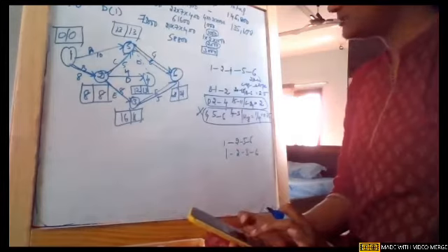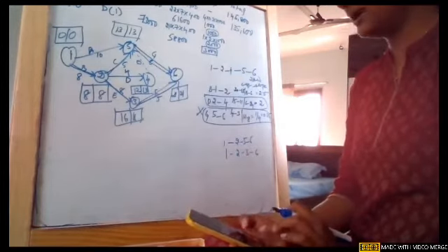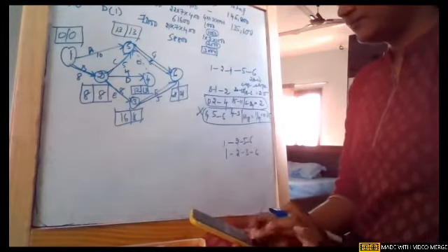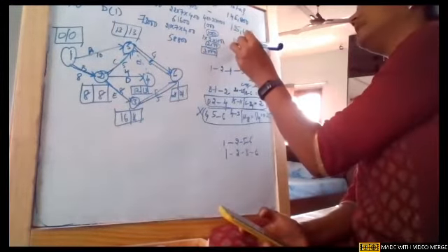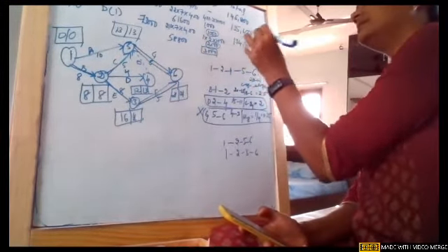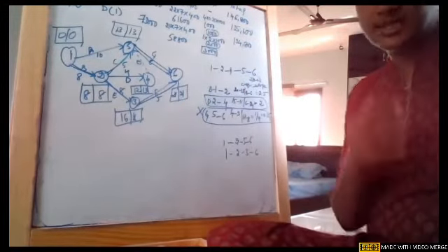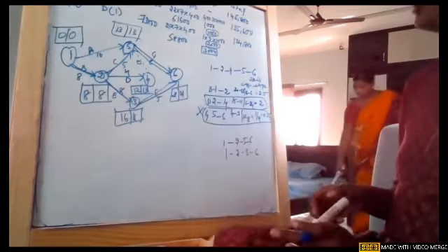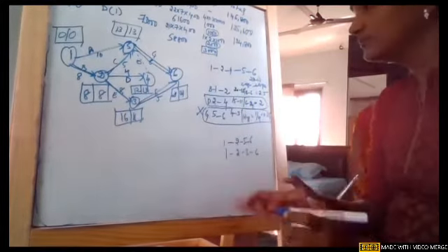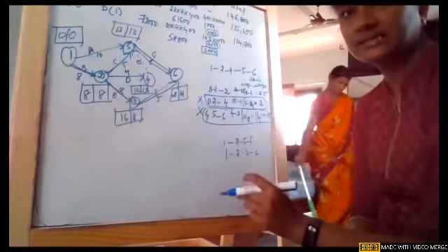The crash cost is 3000, and then the normal cost is 73,000. So we got it to be 1,34,800. So we are able to reduce it, girls. Okay. So now there is one small modification we are supposed to do. So we crashed 2 activities successfully.